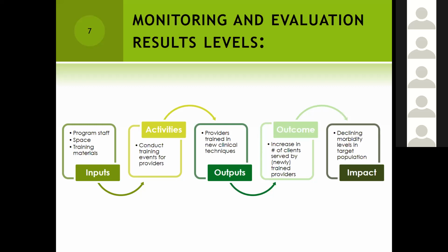If you're planning to conduct some training in one way or the other, the activities that will come in here will be thinking about how to conduct training events for providers. Those will be the activities, and from these activities, they will lead you to outputs. That is, the providers will end up being trained in new clinical techniques.